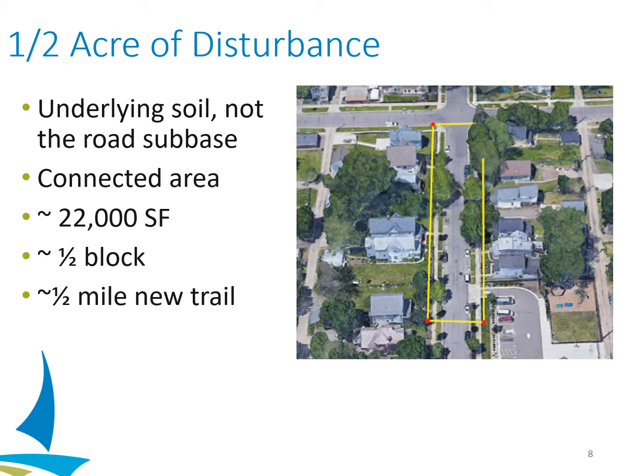In layman's terms, we're talking about about 22,000 square feet of disturbance — roughly half a city block. Or if you're installing one-half mile of new trail or more, that's likely going to trigger the ordinance.